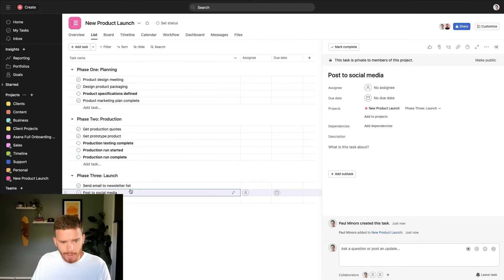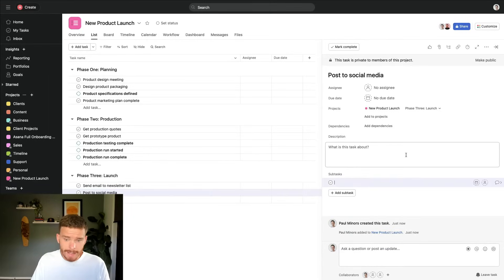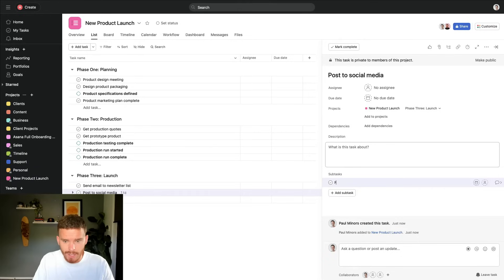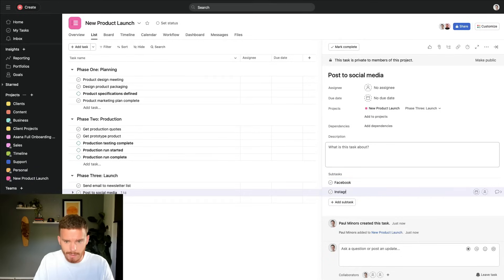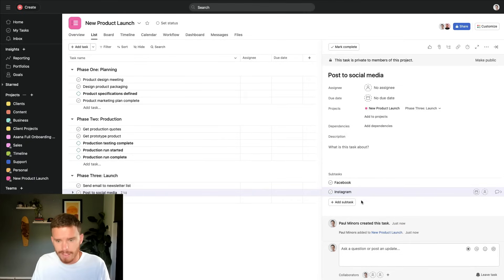I can also, if I click one of these line items, I can open the task here and I could add subtasks if I want to further break down a task into smaller steps. So I might say Facebook and Instagram, posting on social media, I want to make sure we post on various platforms.